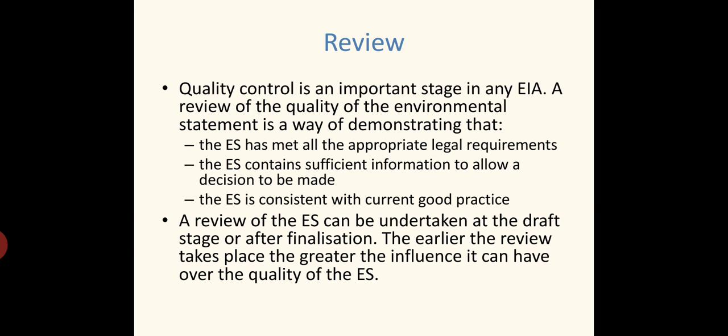A review of the quality of the environmental statement is a way of demonstrating that the environmental statement has met all the appropriate legal requirements, contains sufficient information to allow a decision to be made, and is consistent with current good practice. A review of the environmental statement can be undertaken at the draft stage or after finalization. The earlier the review takes place, the greater the influence it can have over the quality of the environmental statement.